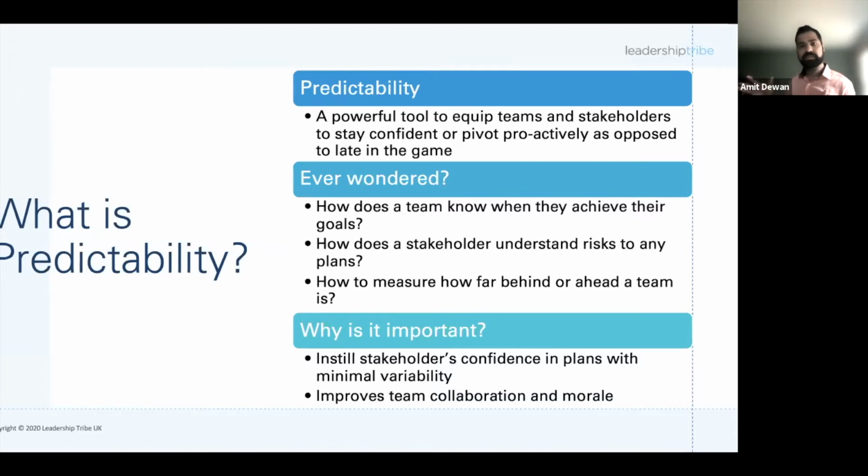If I'm looking at, let's say, a burn up chart, and I'm seeing that, oh, we've got a 3-month plan, and midway through we are 20% done with our plan, then you already know, or maybe probably even before that, you'll know we need to have a conversation about it and see what's something that we can do.